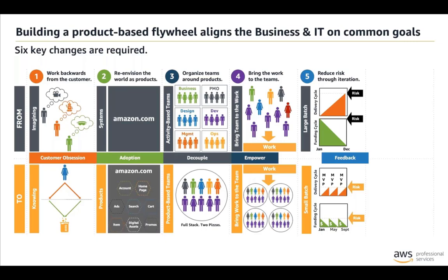Instead of annual funding releases, move to something that resembles startup funding. After each release of an MLP, measure to see if the business value that justified building the MLP is actually realized. If it is, release more funding. If it's not, that's an opportunity to change directions or even kill the product altogether, avoiding additional opportunity cost.